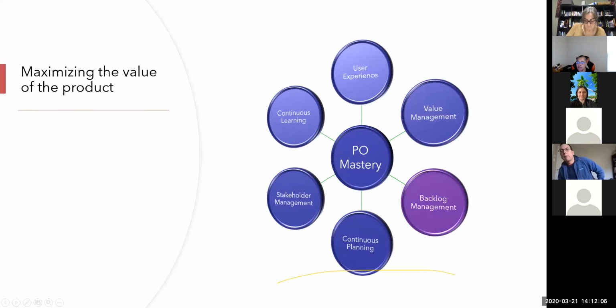Next, backlog management. Just, you know, what stories am I going to have? What outcomes do I want? How am I going to make sure that they're written as full stack slices versus layer by layer of components? How do I make sure that I have enough stories for at least 1.5 to 2 sprints so that they're in a ready state? Actively listening to make sure that your developers aren't trying to put things in that you really don't need, even though they think they're needed.